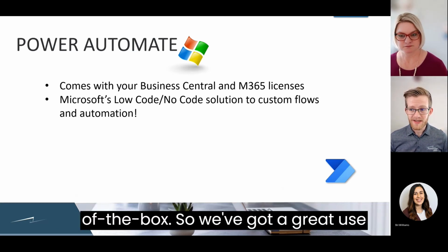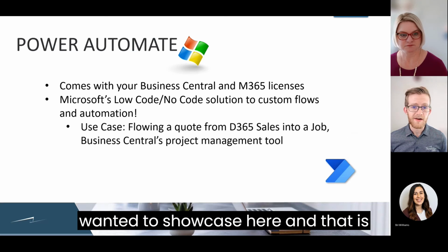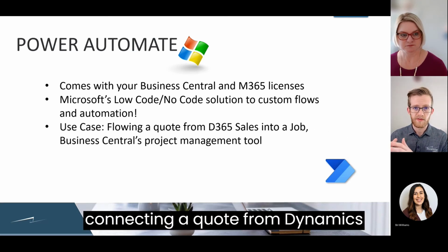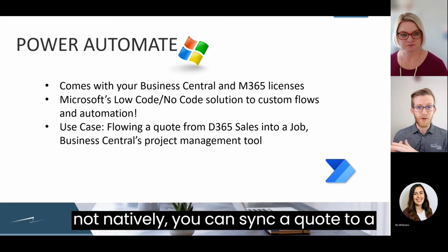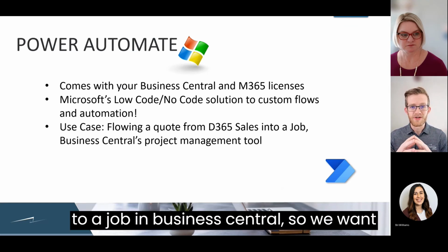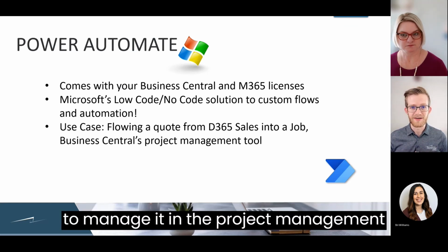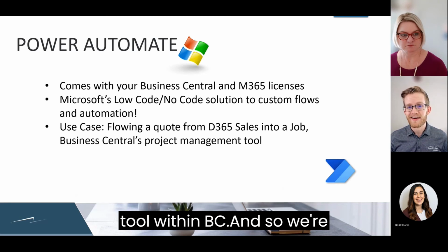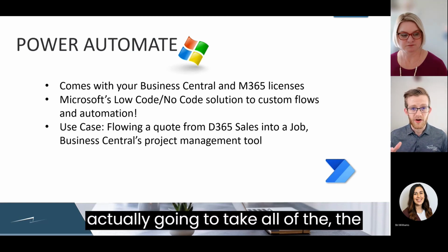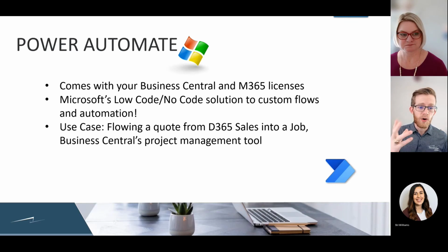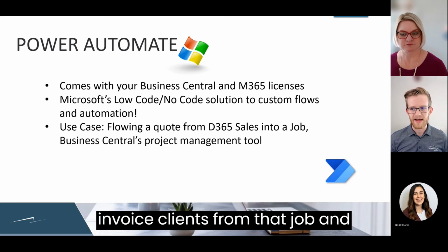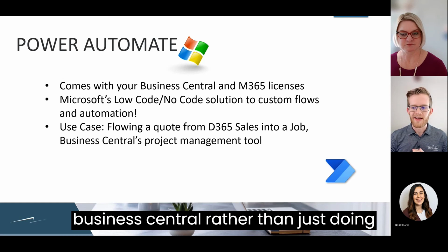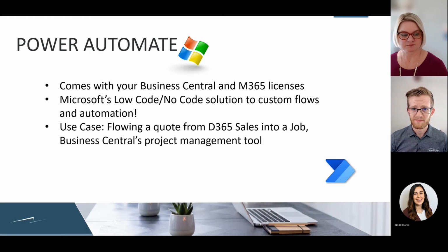So we've got a great use case that we've worked with and we wanted to showcase here, and that is connecting a quote from Dynamics 365 Sales to, not natively, you can sync a quote to a quote, but we're going to sync a quote to a job in Business Central. So we want to manage it in the project management tool within BC. And so we're actually going to take all of the quote with all of its lines and send it over to Business Central. And this way, as a project manager, you can track the project costs, you can manage resources, you can invoice clients from that job in Business Central rather than just doing a quote to order process.